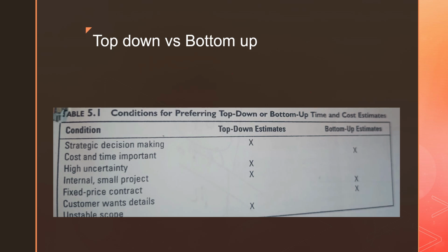We will determine the cost that will be incurred for each activity and task, and further we will sum up all these costs and say to the management that, all right, the project requires a 10 lakh budget, and it requires this many resources, man resources, machine resources, and all these different types of resources. We will sum up from the bottom to the top. That is called the bottom-up approach.